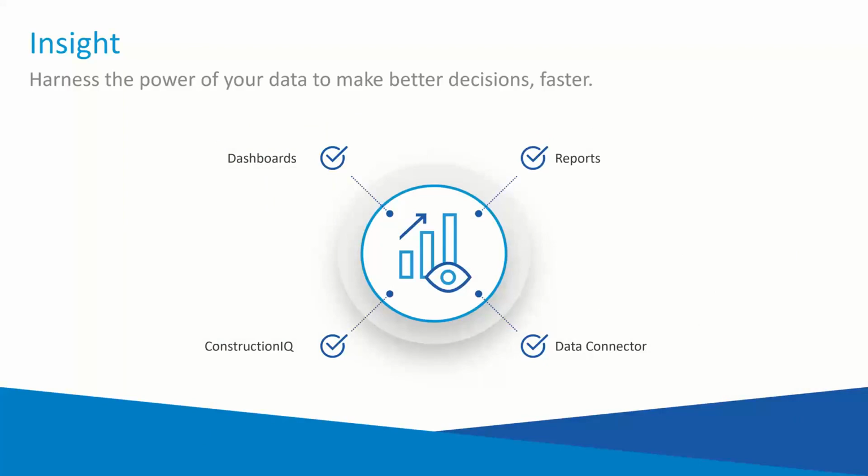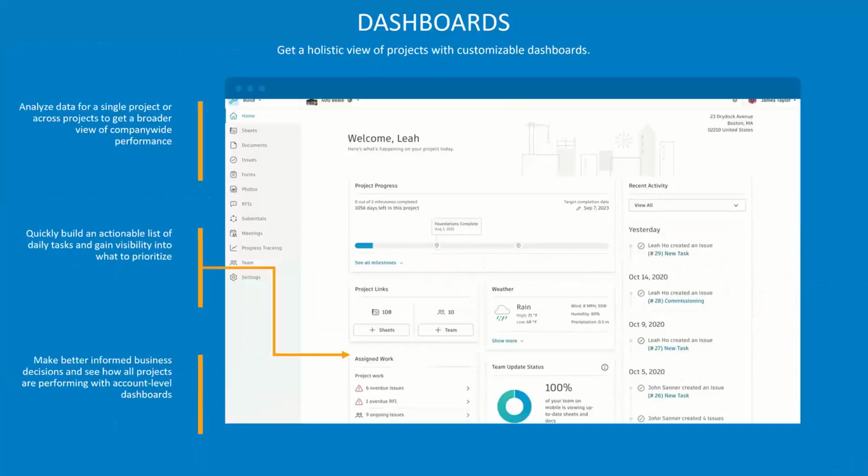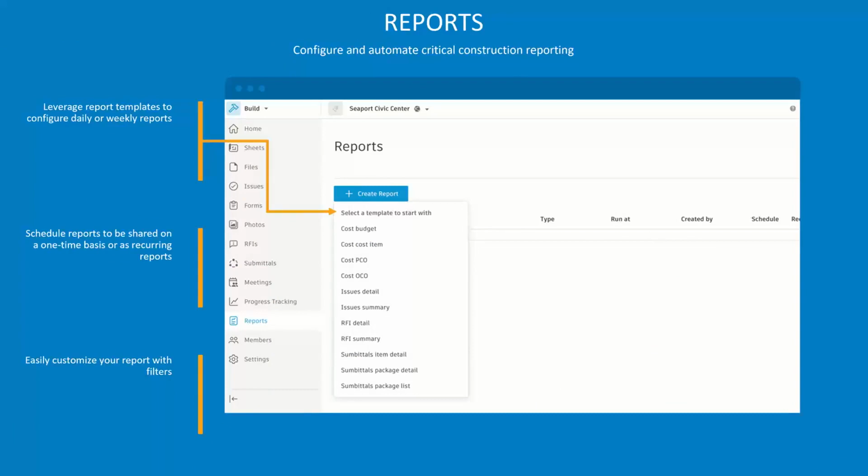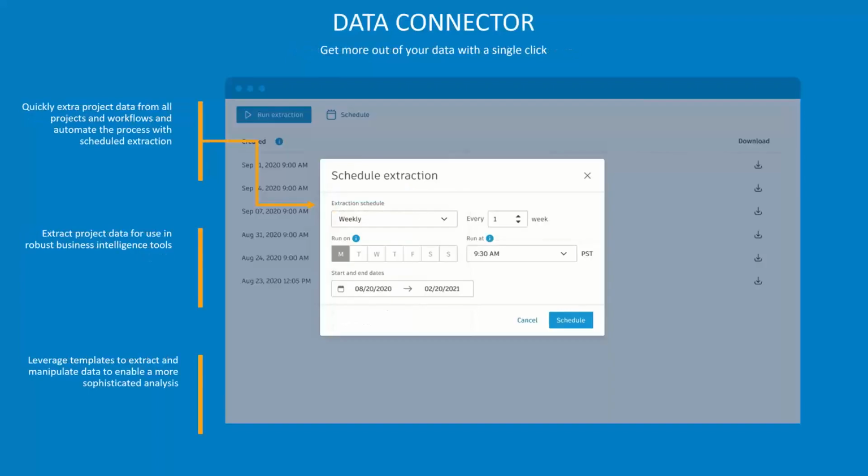And again, the key here is because all of this data is in one single cohesive place, everything from the earliest stages of design to hand over to the client, we have the ability to have the insight here, the ability to look at this data, create dashboards for our project so that we can pull out using reports, so we can gather information on, hey, show me all the RFIs that are due this week, or issues that are past due, or issues that are for a specific subcontractor. I can come in and pull all this data out into what we call the data connector, into a number of files that can be then connected to Power BI if we want to analyze it further beyond what the system does.